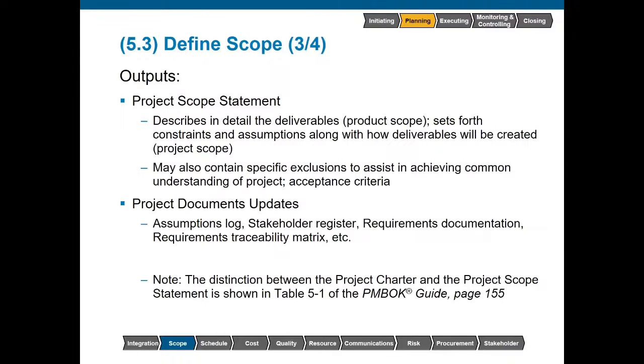The project scope statement. This is going to be one of the key outputs coming out of this process. I do want to go ahead and differentiate between the product scope versus the project scope. So if we were talking again about a personal electronic device, let's say it's going to be a tablet. We have certain requirements that our customers will give us, and these might include front and rear facing cameras, LED illuminators, intuitive touchscreen, buttons, switches, speakers, processors, batteries, perhaps some aspects of the casing. Now, that would be the product scope.